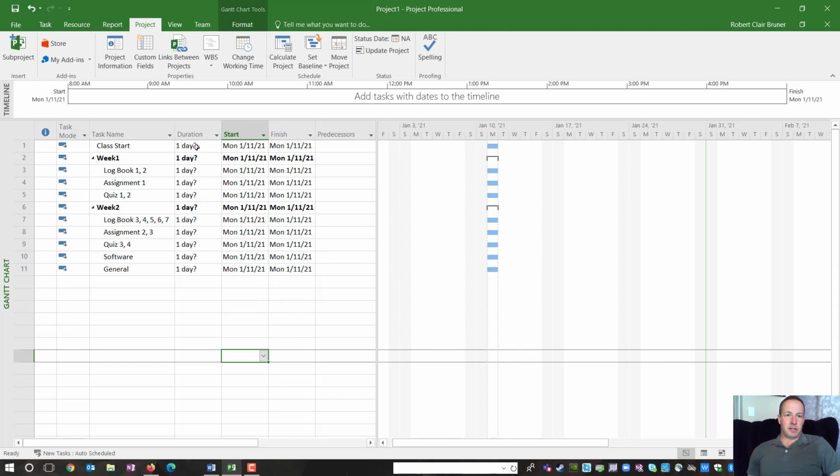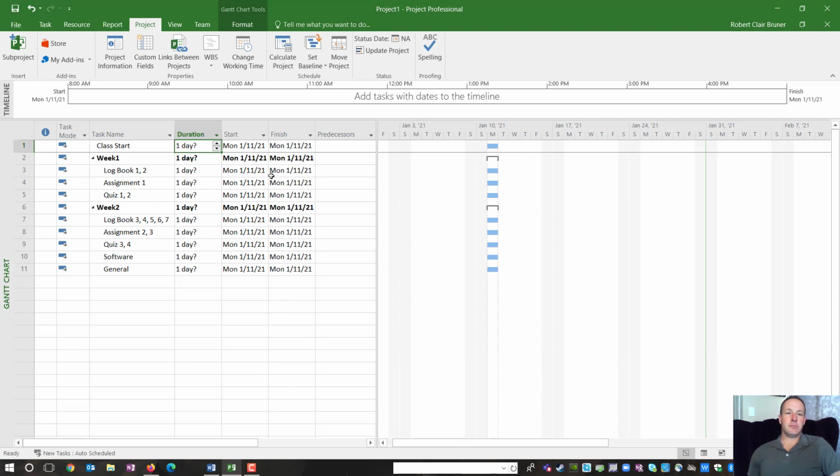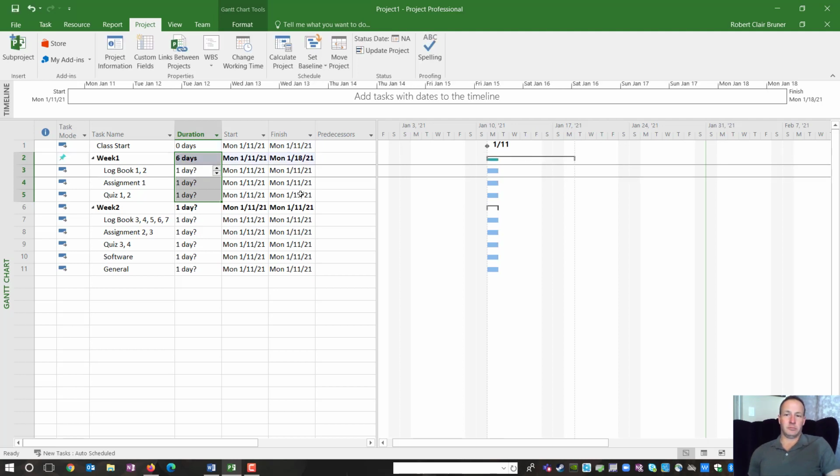So my class start date, you can make this a milestone by saying 0 days. And then all of these, you want these to be due the next Monday. So you could say 6 days, right? And then that is now due Monday the 18th.